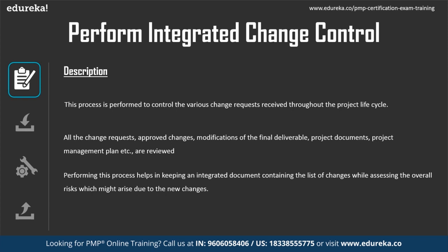There is something called the 7 R's of change, which we discuss while doing service management. That is: who raised the change, what is the reason for the change, what is the return from the change, risks of change, responsibilities of change. Likewise, we define 7 R's. There should be an answer to those 7 R's. This process is performed to control the various change requests received throughout the project lifecycle.